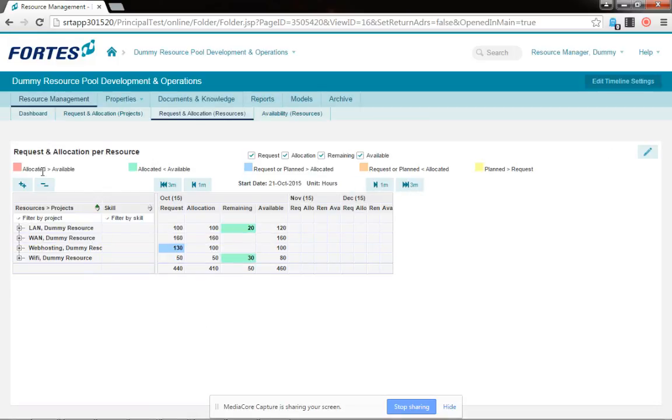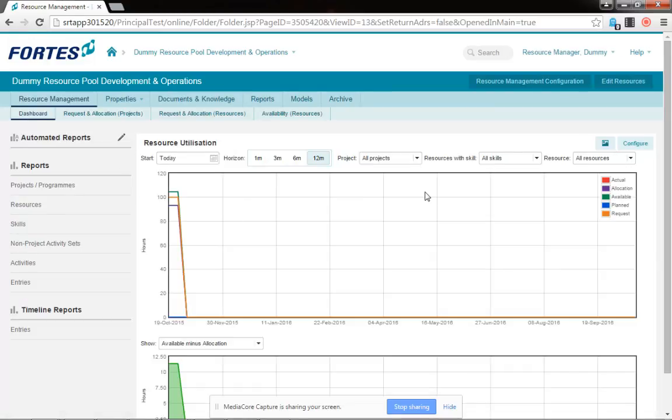After filling this out, you can go back to his dashboard, where there is this widget which is now very empty, but has all the columns that we saw: the allocated hours, the requested hours, the available hours. If he sees that the orange line of requested is way above the green line of available, then he knows for a particular month he has to take action. It's a nice touch.